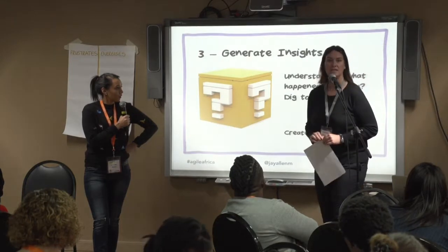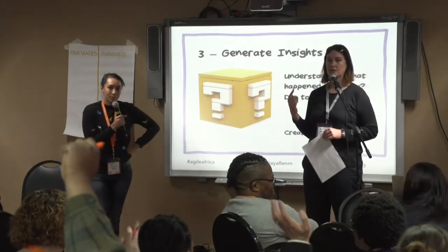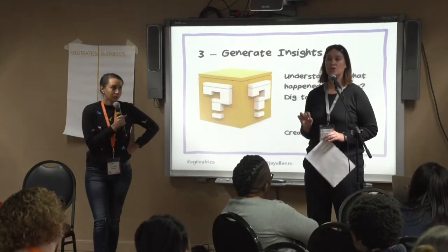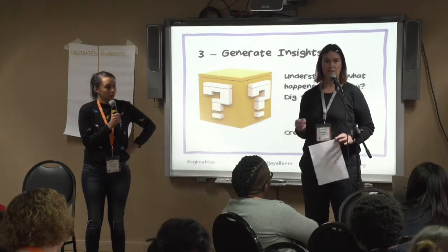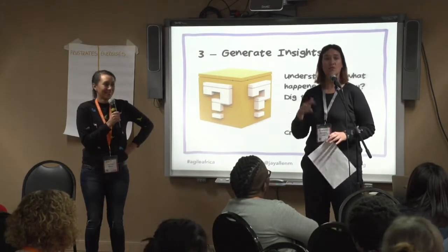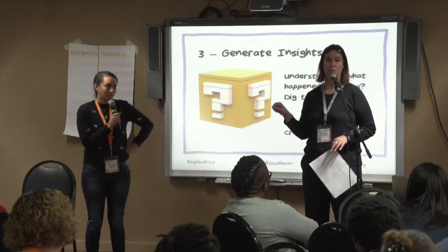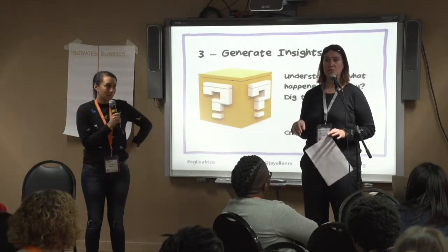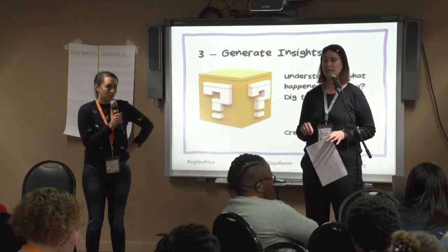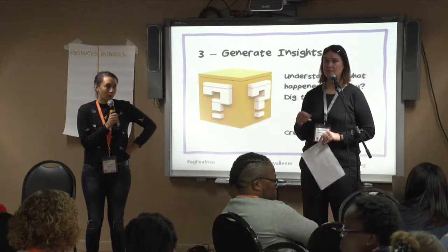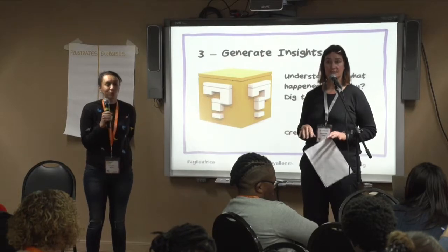Hands up, who goes to retros and the same thing comes up every single time? Yes? The reason why that happens is because you are not getting to the root cause. So if I keep walking into this chair and the action from my retro is to buy Band-Aids, I'm not going to stop walking into the chair. The next retro, I'm going to have to buy more Band-Aids. At some point, someone's got to dig deep enough to move the chair. If you're a Scrum Master and something's coming up a second time or a third time, you are not digging deep enough. Dig more.